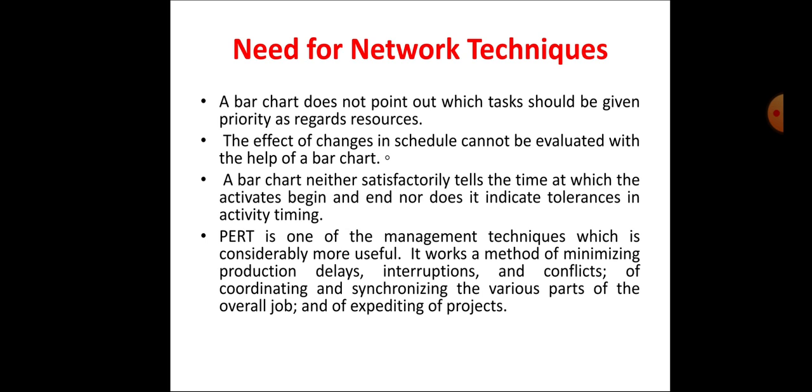The effect of changes in schedule cannot be evaluated with the help of a bar chart. A bar chart neither satisfactorily tells the time at which an activity begins and ends, nor does it indicate the tolerance in the activity timings.